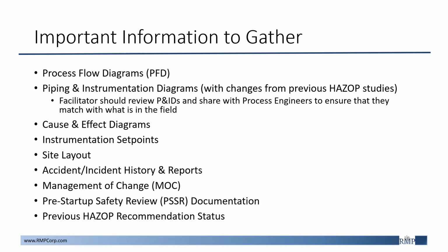One way to be well prepared for the HAZOP study is to make sure that all important information is gathered prior to the study date so that the facilitator can ensure that all required pieces of information are gathered to properly perform the study. If this information is not provided, the session time must be spent gathering this information, and the documentation for it must be as well. And that is not a valuable way to spend the time of a HAZOP study.